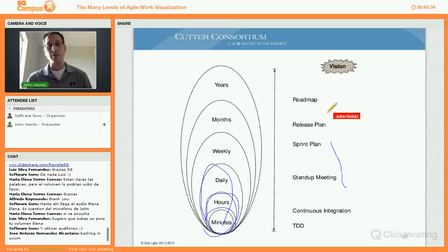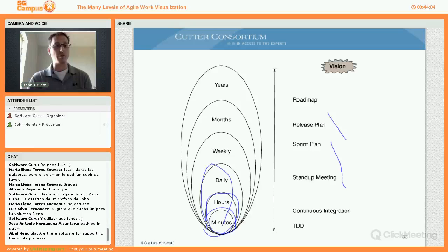At the next level higher, the release planning stage, where we're planning months and weeks of activity out into the future, we can identify dependencies between different teams. We can schedule out how long we think things might take in the next weeks or months, look at that in a visual timeline in a release plan, and say, yeah, those things seem reasonable. We think we'll get these stories, these cards, done in this time frame, and not in that time frame.